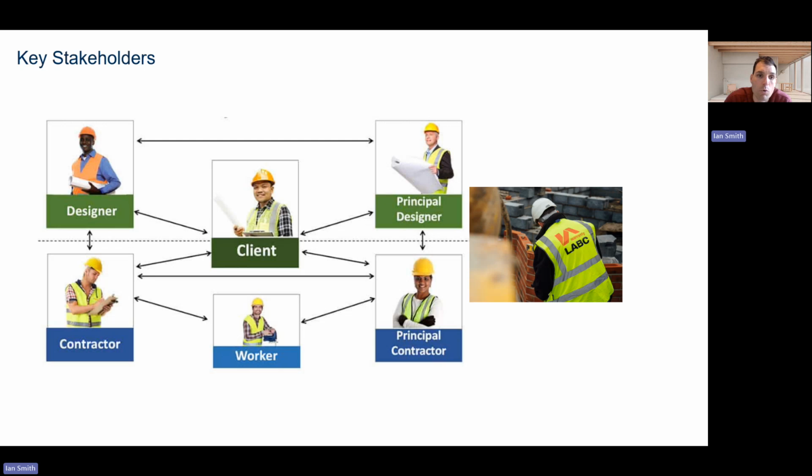to plan. We also have other stakeholders, such as our structural engineer, who has designed the foundation specifically and ensures that they can safely support the loads from the superstructure. Their calculations determine foundation type, reinforcement requirements, and concrete specs. So their influence is essential because any design changes or structural concerns can affect our excavation depth, quantities, and scheduling.